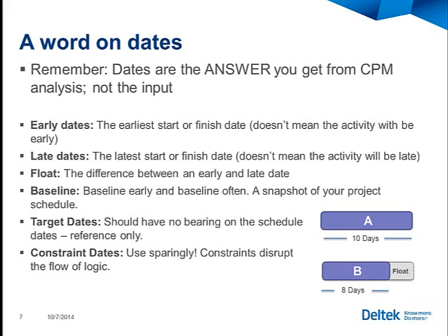And by the way, you would have to do that every day, because the moment one date changed on one activity, you would need to change all the other dates for the 10,000 items. At least in most cases, you probably would. So why not have a computer do that? Let's train the computer on how your project is executed by telling it what the activities are, how long they'll take, and what the sequence of activities is. And then we can have the system come back and tell us what the dates are.